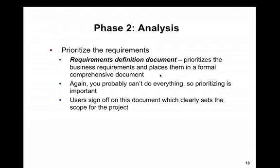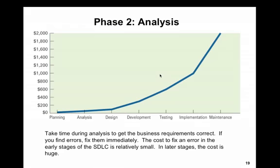In terms of analysis, you prioritize requirements. They end up in a document called the requirements specification document. You list everything out, document it, and it becomes a contract. You take the documented requirements, get them signed off by your boss, and most importantly get the customer, end users, or department to sign off — confirming this will meet the requirements and solve the problem requested. That's how the analysis works: planning, analysis, design, development, testing, implementation, and maintenance.